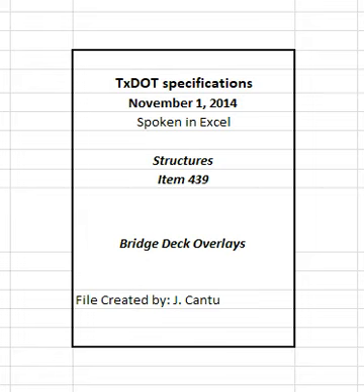5.1.2 Certification of Compliance. Provide a certificate of compliance from an independent, nationally recognized laboratory stating the materials to be used meet the requirements of this specification. Furnish samples of the materials to be used as required by the engineer. 5.1.3 Material Safety Data Sheets. Provide manufacturer's material safety data sheets, MSDS, for all materials to be used on site and certification the materials conform to local, state, and federal environmental and workers' safety laws and regulations.